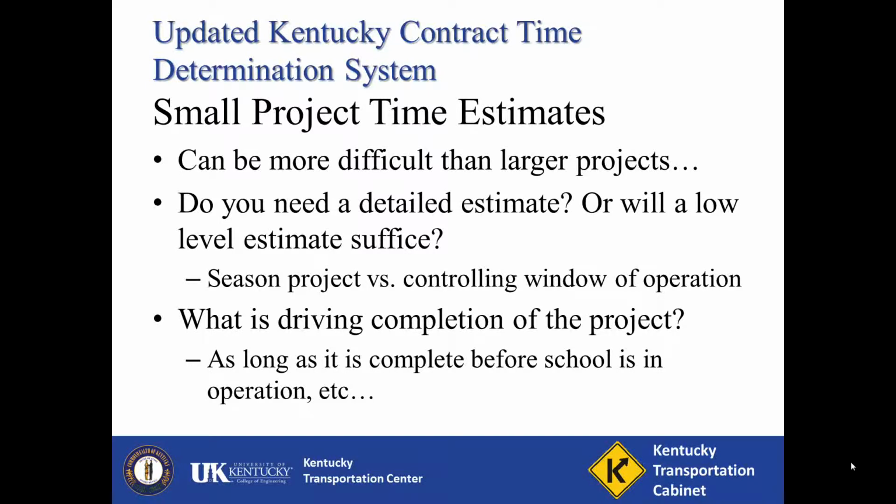Another example would be if the project had to be completed while school was out of session. In this scenario, assuming the project is less than 75 days, there is no need for a schedule because the constraints define when the project is to be started and completed.